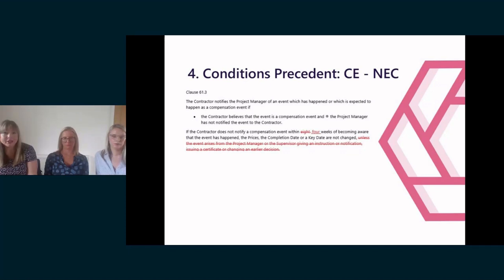It is therefore key that those individuals who are running projects on the contractor side are aware of any condition precedent clauses relating to time and ensure that the correct notices are given to avoid losing any entitlement under the contract. When in doubt, issue a notice. It is far better for a contractor to issue a notice than not to protect its position in the future. We see contractors fall foul of condition precedent clauses frequently, and it can be easily avoided if those people actually running the works are aware of the notice requirements and the consequences if such notices are not given.